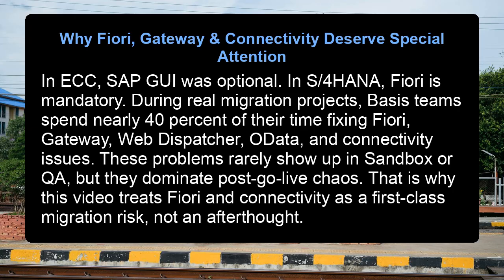Why Fiori, gateway and connectivity deserve special attention. In ECC, SAP GUI was optional. In S/4HANA, Fiori is mandatory. During real migration projects, Basis teams spend nearly 40% of their time fixing Fiori, gateway, web dispatcher, OData, and connectivity issues. These problems rarely show up in sandbox or QA, but they dominate post-go-live chaos. That is why this video treats Fiori and connectivity as a first-class migration risk, not an afterthought.